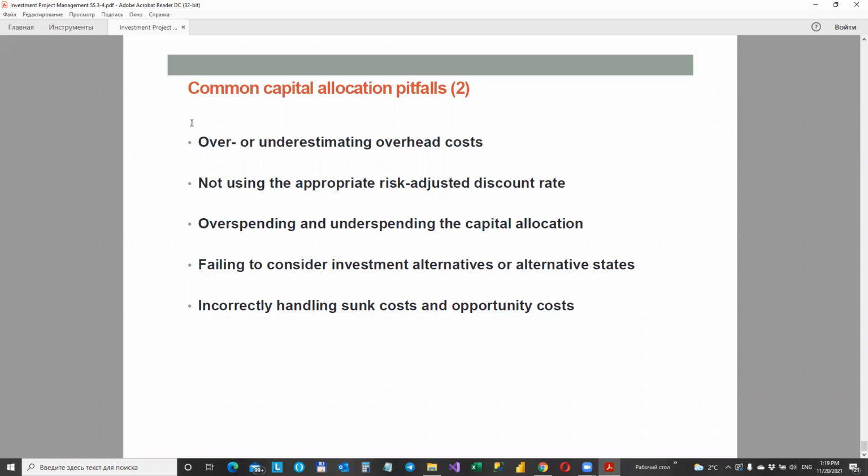And it's often the case in small companies, where you have salaries for your management, and this management is responsible for many projects, but his or her time and salary are not accounted for as a cost of the project. That leads to situations where the budgets are ruined, and even cases where you do not have enough cash to pay the salaries for your employees.